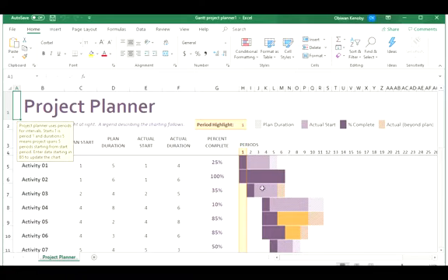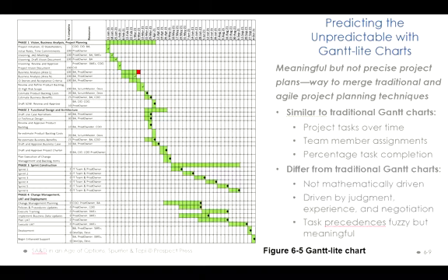So using the Gantt chart is one of the important lessons I would like you to take away from this particular class. Coming back to the Gantt chart we see, it is called Gantt chart light, and you see that the ambiguity is also represented by the overlapping of the precedence relationship between one job and the other. So they will be overlapping from one phase to the other. When I say overlapping, I'm relating to something like this. This is the overlapping area that you're looking at. The starting point can be ambiguous in a way between each two jobs.